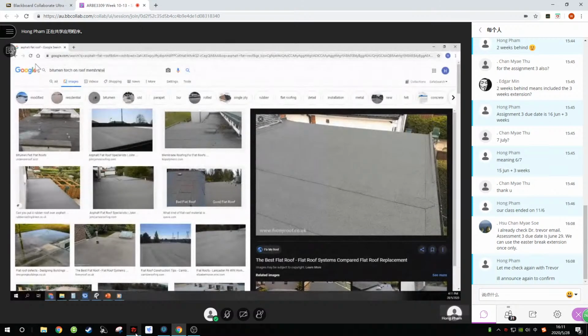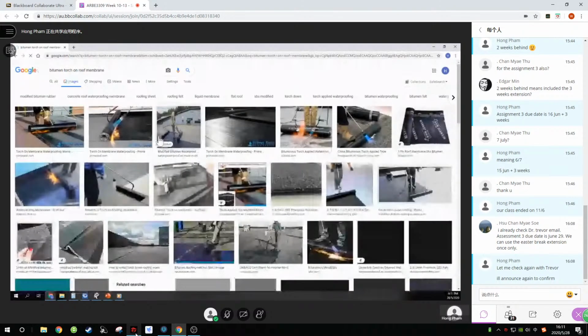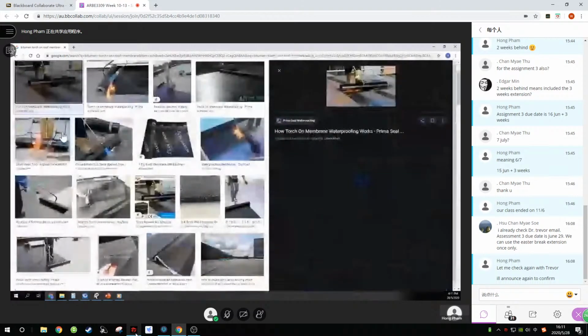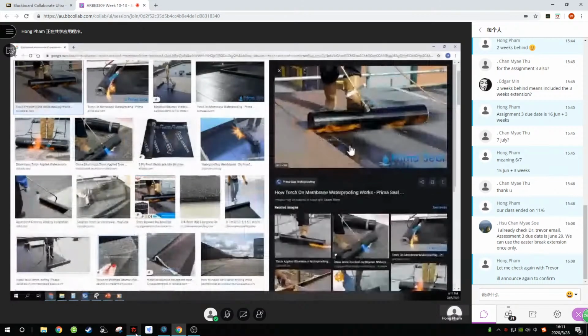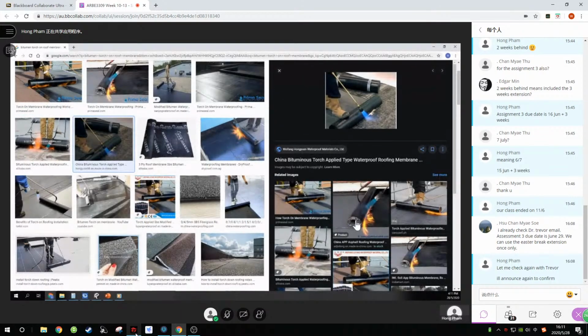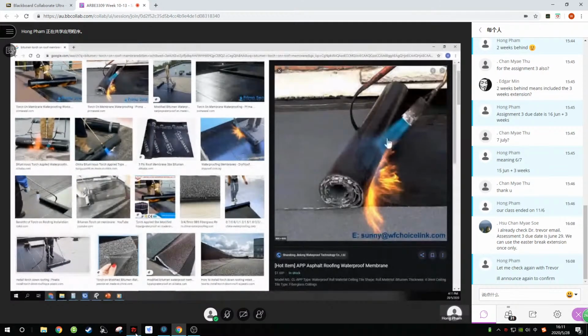So slide number 9, we look at the roof coverings. We've also got pavings. This one is a bitumen torch-on. That's where you might have a protective slab over the top of the roofing membrane. That's not measured in concrete. Typically it would be put up in roofing. Another term for that, I've just remembered, is a wearing slab. So if you hear that term, it goes over the roof membrane to protect it.